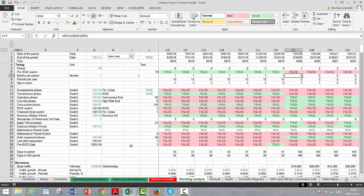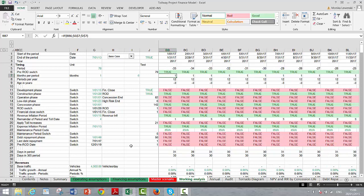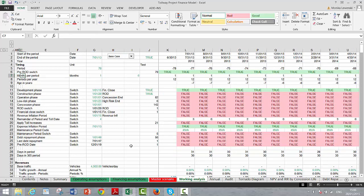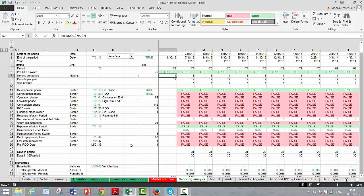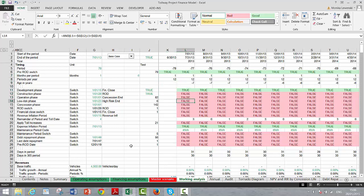In that way you can have the model switch between a monthly basis during construction and a semi-annual basis during operations, which is a common approach. These days I keep operations on a separate page, all monthly, and then convert them to semi-annual. You could also do everything monthly and just accumulate things.